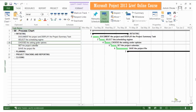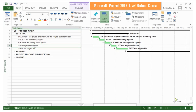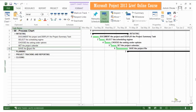Using options, we will see how to set up currencies, how to set up date formats and other environment variables. We will then look at the various different types of calendar supported by Microsoft Project and how you can create your own project calendar to capture the working and non-working rules for your project. We are also going to learn resource calendars and task calendars, and we will see the precedence of calendars used by Project for scheduling your project tasks. We will also look at some saving options like giving password-protected files and creating read-only project files.